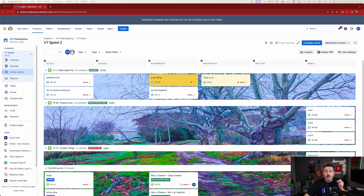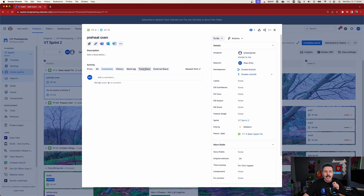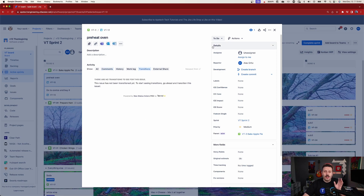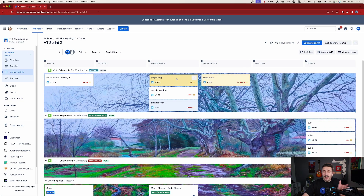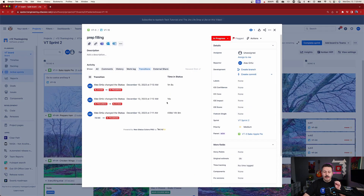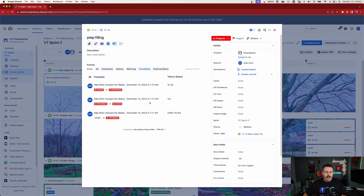There's also a really cool added feature with New Status Colors Pro: a new Transitions tab. Once the app is connected to your Jira and you click into it, you can see the full history of status transitions for an issue. It gives you a paper trail and, most importantly, shows how many days the issue has been in each status. For example, 439 days in one status is a long time, while another story might show a few minutes or hours — giving you great insight into flow.